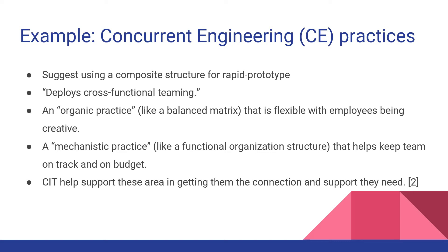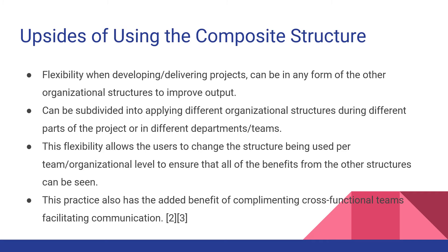CE suggests that a composite organizational form is best for rapid prototyping and cost-effective product development. The composite organization in CE deploys cross-functional teaming, an organic practice like a balanced matrix that facilitates creativity, and mechanistic practice like a functional organization structure that helps keep cross-functional team design projects on schedule and within budget. CIT can extend these capabilities by facilitating communication across disparate functions and by allowing product design teams to take part in design controls and software applications.